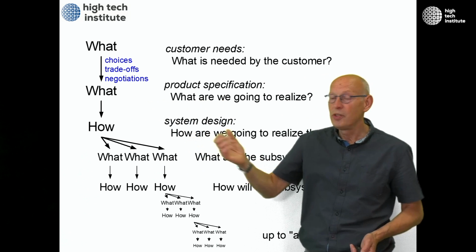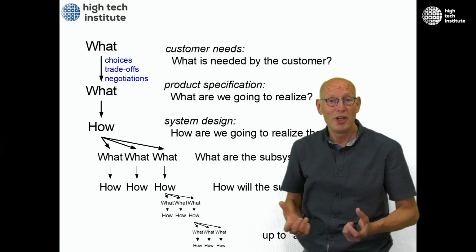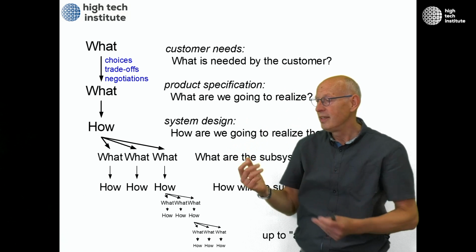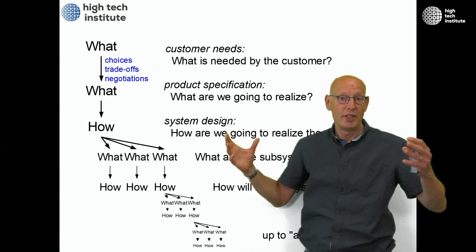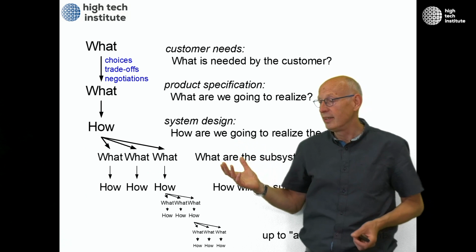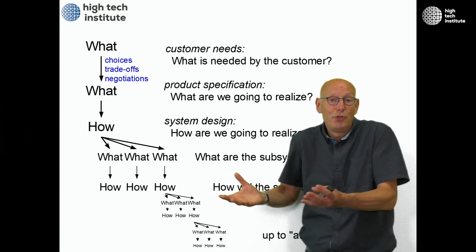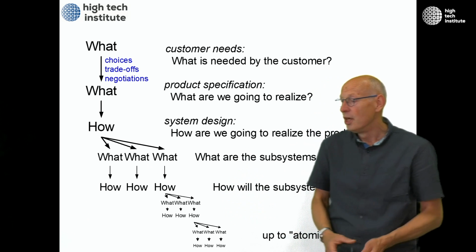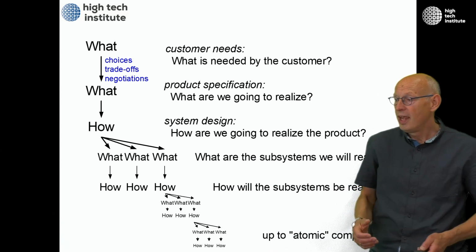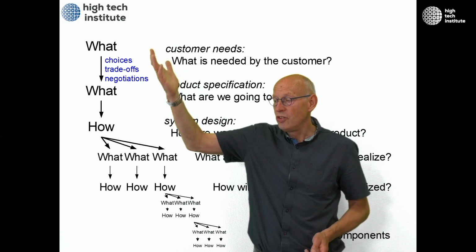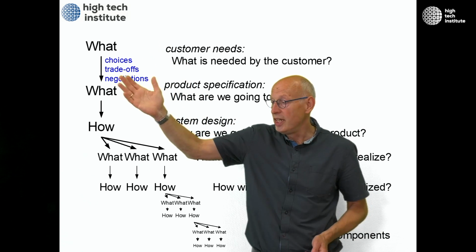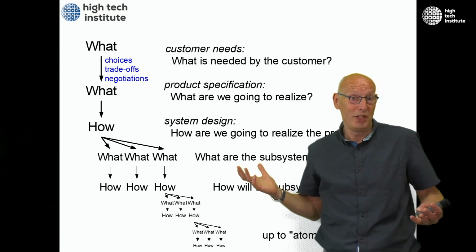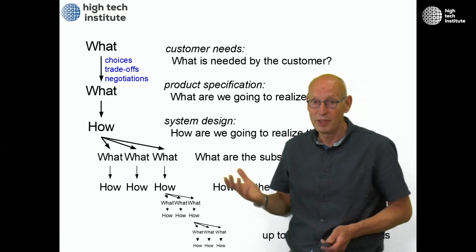And then a very important step comes, how about the design or the top level architecture? We understand the needs, but how can we break that down into a system breakdown or system architecture? And that will lead to subsystems, subcomponents, which have their requirements again, and that goes in a kind of hierarchical breakdown of the total system. And it means that a lot of discussions have to be done with the customers. You see here, trade-offs have to be done, how to negotiate what is, well, the customer might have interesting wishes, but can it all be fulfilled?